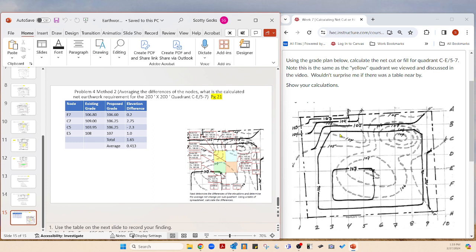So when you get into the estimating course, the first thing you're going to do is probably some of this stuff, and maybe take a brief look at a mass haul diagram, because the most important expense that you look for, according to what you've learned so far in excavation and grades, is the haul distance.